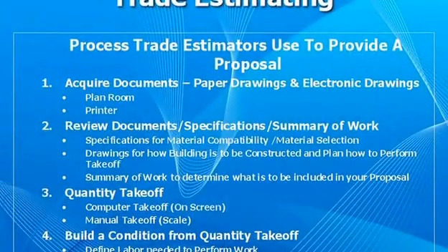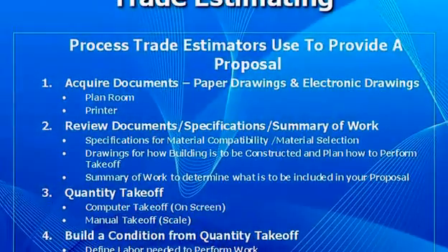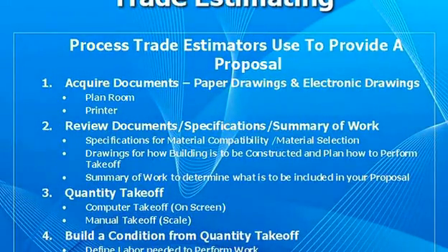The last item I wanted to talk about was building the conditions, your crew composition, how you're going to put it together, because that's probably one of the most important parts of the estimate. It's probably safe to say you've got a fixed component and a variable component. The material is primarily fixed. When the economy is bad, or fuel prices go the way they are, that might change things on the material, but in most cases your material is a fixed cost. Labor is the most important thing to make sure you have right.